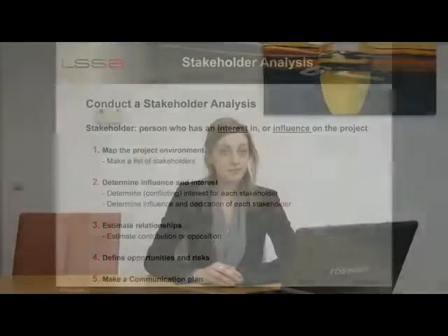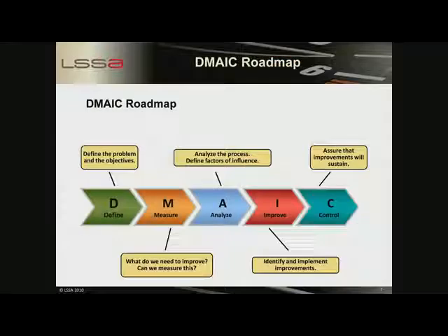The Six Sigma roadmap follows the 5 DMAIC steps: define, measure, analyze, improve, and control. Each step is finished with a tollgate review and a decision to either proceed or not with a project. All of the steps need to be taken in order to guarantee that no important steps of a project are neglected or forgotten. In the next slide, we will look at the DMAIC roadmap in more detail.